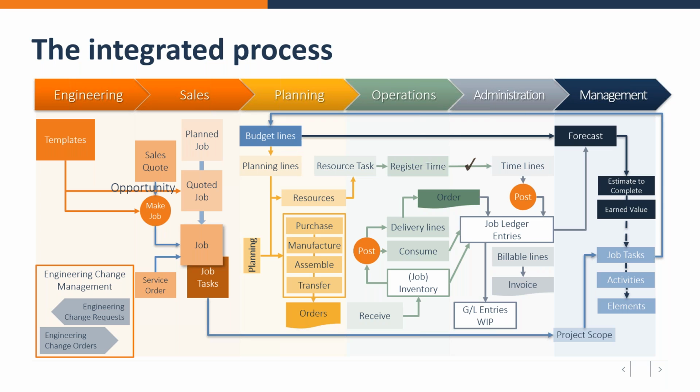And then finally, from a project management standpoint, when you look at managerial accounting, you want to make sure that as a post-mortem, when projects are completed or closed, or even maybe in process, there are meetings internally on whether we are trending against our budget, what we initially expected for our projects, because you can see what actual costs are incurred to date in real time in an integrated system. Or when the project is closed, being able to accurately understand why we made money or why we did not make as much money on a project, and take that analysis and implement those process improvements for the next project.